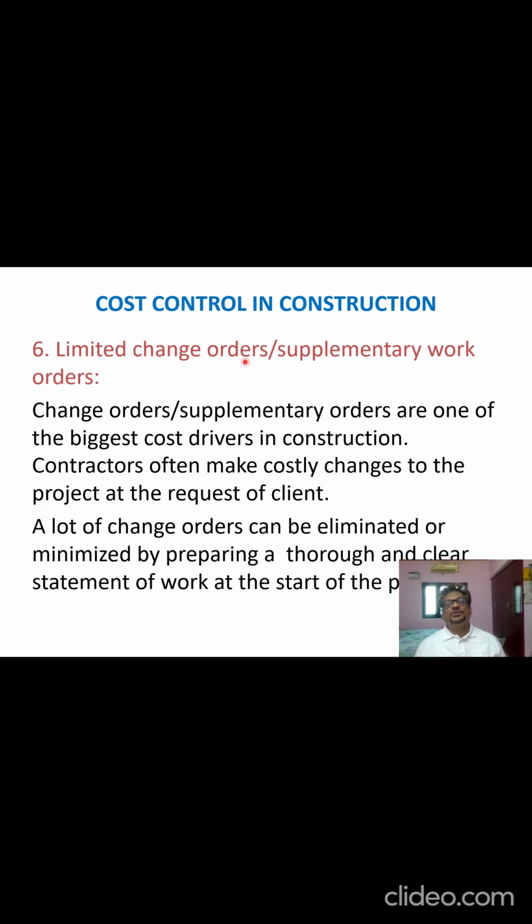Supplementary work orders, or limited change orders. This is also important. We need to limit the changes during the construction process. Whenever there is a change in the orders, it automatically increases the cost as well as the time. Contractors often make costly changes to the project at the request of the client. So this should be avoided.